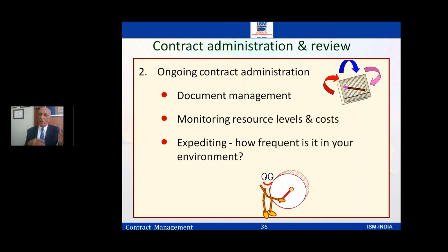Now, contract administration is ongoing: documentation management, monitoring the resource levels and the cost, and expediting, how frequently it is needed. I think one has to expedite also. I'm sure you must have come across this. Even if you're given the date, you have to start telling the supplier well in advance, my due date is coming. Can you expedite it? Can you give it one day before?